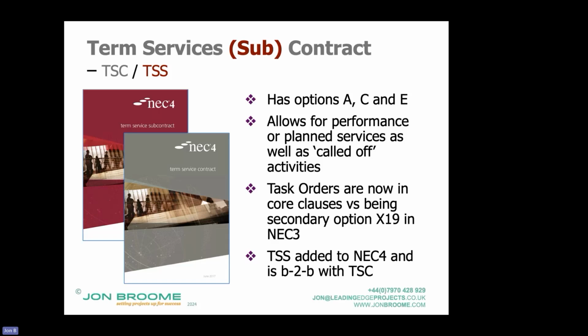Now, that facility in NEC3 to instruct tasks, mini projects if you like, was X19. So you had to include X19. The reality was that clients, in my experience, actually wanted a lot more control typically than just outsourcing it to the contractor and saying, show me the program. They wanted to be much more directing where the contractors worked.